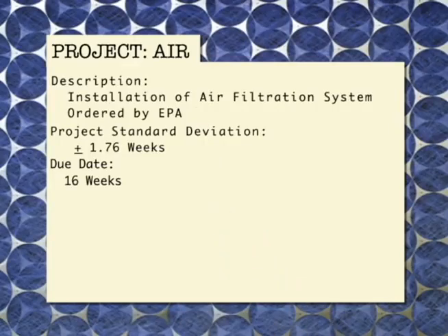We have assumed this, and we're going to assume one other bit of information, and that is that the project duration is 15 weeks, okay? So we have all of this information. Now we want to know what the probability is of finishing this project, having it done by that 16th week. Well, we need something called a z-score. You remember those from statistics?